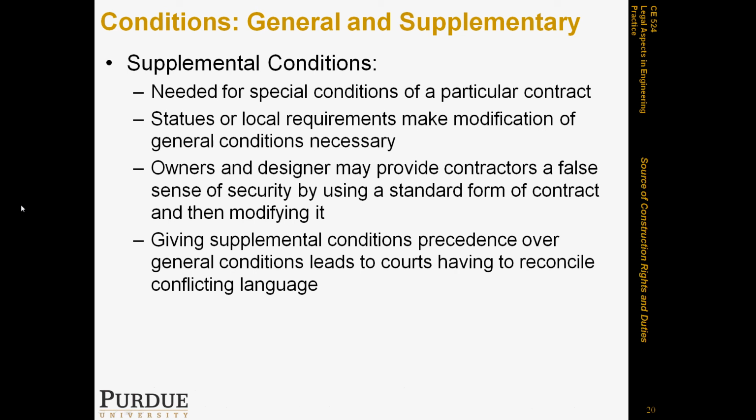Sometimes if you give precedence to supplemental conditions over general conditions, it can actually give courts or judges room to reconcile conflicting language. The reason being is that if you give the supplemental conditions precedence, it means that you're very intentional and purposeful in changing the language of the general conditions.